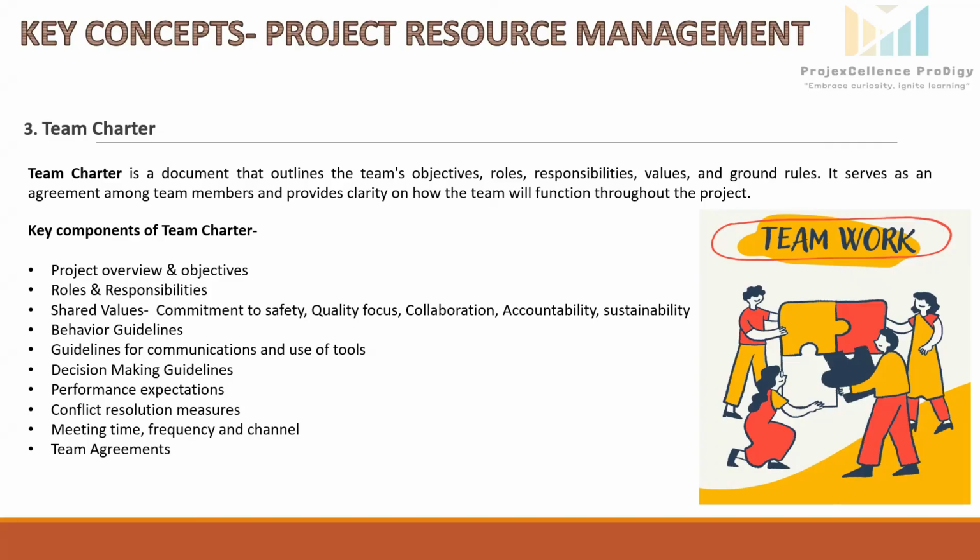Conflict resolution measures, what will be the steps? Like step 1, internal discussion between the involved parties. Step 2, mediation by project manager. And if not resolved, then step 3, escalation to steering committee.